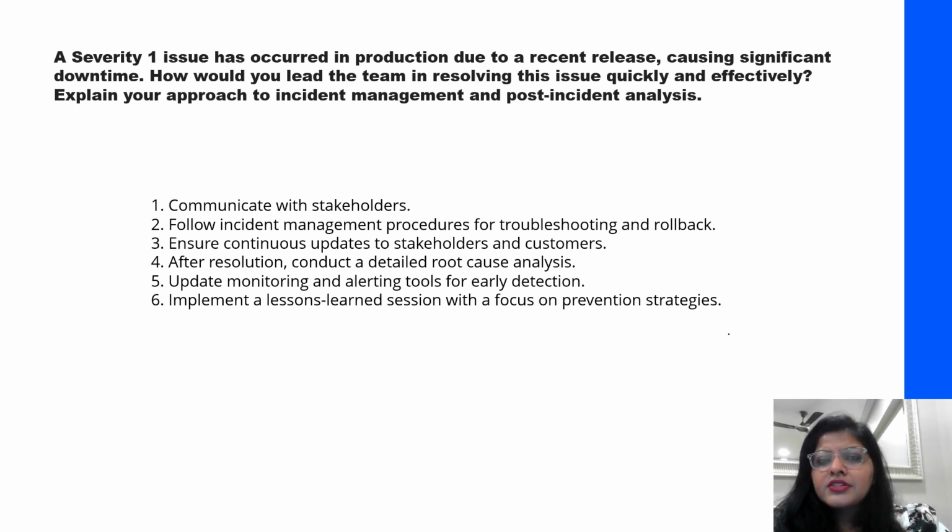This incident happened with us where there were two cross-functional teams. We got everybody on the call, engaged in a war room, where everybody quickly checked what could be the possible issue. Once that was done, a detailed root cause analysis was done, and parallelly the code was being rolled back. The impact of the downtime, the dollar impact, or any impact on the particular application needs to be communicated very clearly to all the stakeholders and the customers.